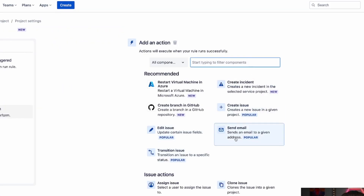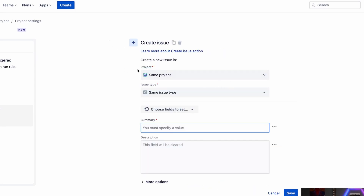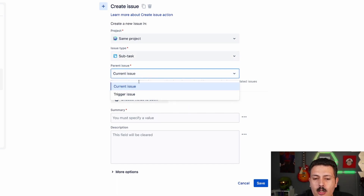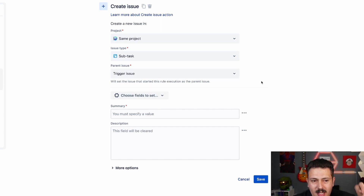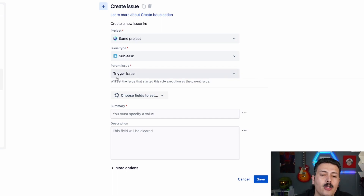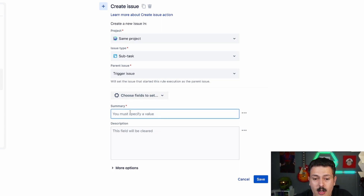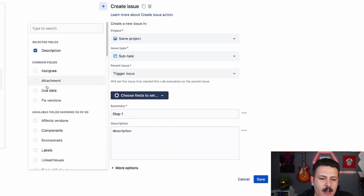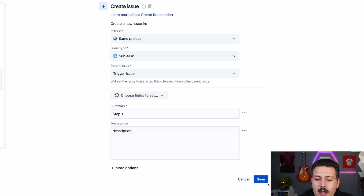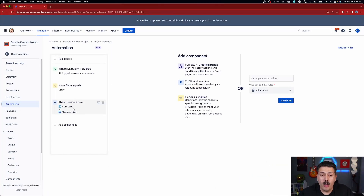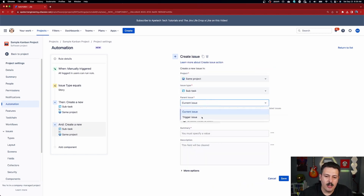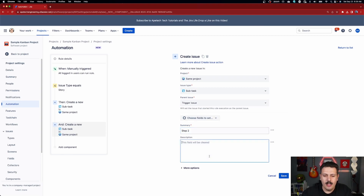Next, once we have the condition, we're going to create an issue. Click on the create issue button. We're going to leave it in the same project, but change the issue type to subtask. The parent issue is going to be the trigger issue — since we're doing this manually, we know the trigger issue because we clicked into it. Then you literally just type in whatever you want for the summary. This is step one. You can put a description, assign them to somebody, add due dates — whatever you want — and then hit save. That is the first subtask. If you want another one, you do the same step again: create another issue, change the issue type to subtask, set the parent to the trigger issue, and enter step two.